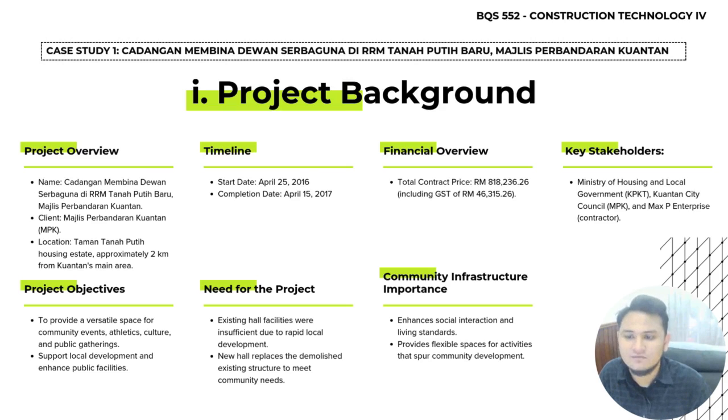So the location of this project is located at Taman Tanah Putih Housing Estate, approximately 2 kilometers from Kuantan's main area. So the timeline for this project is start date from April 25, 2016, and the completion date is April 15, 2017. For the financial overview, the total contract price is RM 880K, including GST of RM 46K.